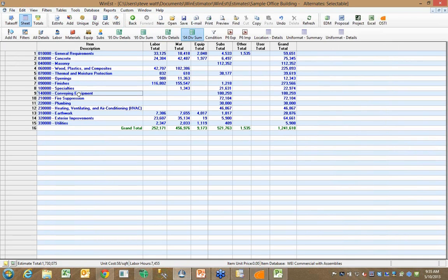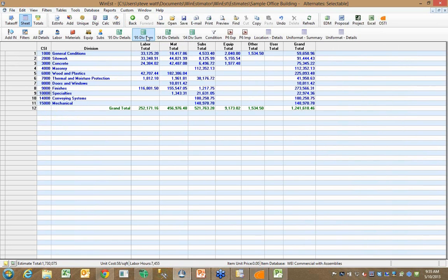Now, I talked about the flexibility in terms of work breakdown structure coding. Right now, I've been looking at things like CSI master format,